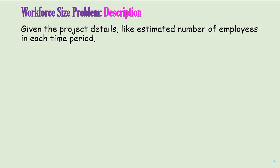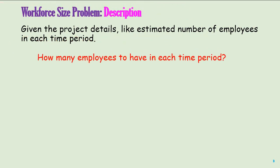Let us start with the problem description. In the workforce size problem, the scenario is you have a project of a specified time horizon, and for this project you have estimated the number of employees that you need in each time period. As a project manager or contractor, you would like to answer this very important question: how many employees to have in each time period? If you match the number of employees in each time period to the estimated number, then you will have lots of hiring and firing of employees.